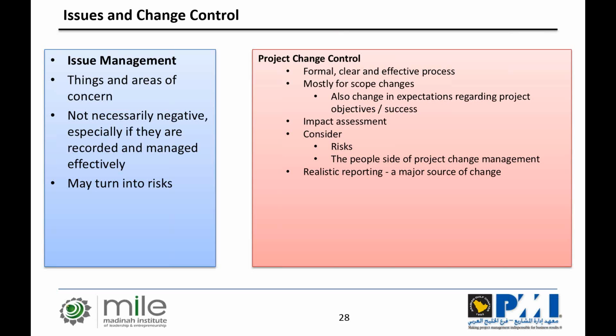Probably the biggest enemy of the peace of mind of the project manager, and of course, the biggest enemy of project success, right? When we don't handle change properly, and handling change properly means go back to the sources, go back to where change is being introduced, go back to the stakeholders and work with them so they are less tempted to submit change requests. I'm not saying to suppress needed change that indicates innovation or improvement in the product. I'm saying check if we really need it from an objective perspective, from a charter perspective. Is this really the thing that we were mandated to do?